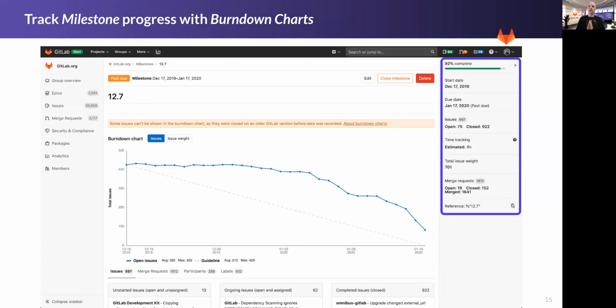That's the goal, but the shape of that burn down is also important because it can tell us a lot about how we're breaking down work items. Perhaps we haven't broken them down with as much specificity as we should, so they're kind of too big to handle in a sprint, or they need a lot of definition, so work doesn't get started on them till later. Can also tell us how stressed out the team might be. Maybe they hit 0, but there's a mad rush at the end. These are all things that are important for you to know long-term for your planning.